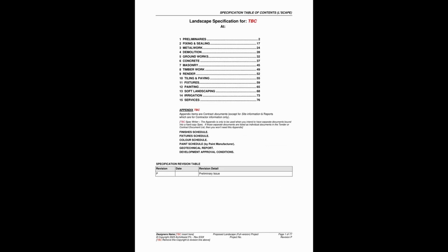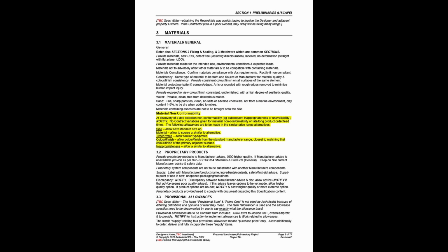The specification aims to be as reliable and safe as possible, closing even little gaps that can lead to on-site disputes. To help achieve this, many defaults exist. These give a direction when a glitch is found, including when spec content conflicts with another document, or when documented site conditions differ from actual site conditions, or when a documented material can't be sourced. A range of other defaults exist in the specification.